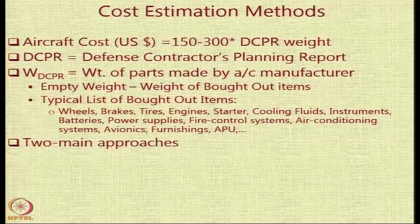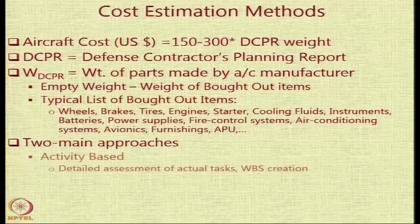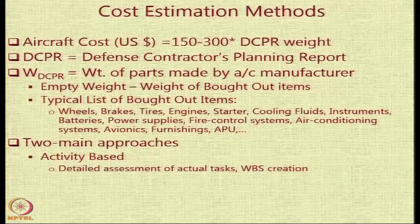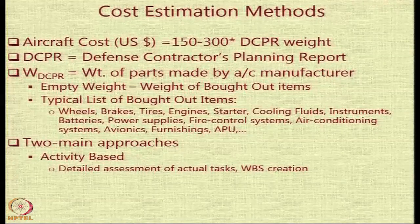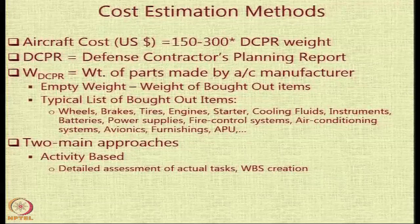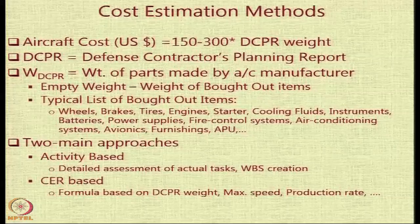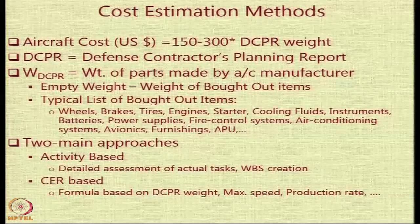We admit that this particular method is a very crude method. Then there are two other approaches. One is called the activity-based approach, in which the actual tasks to be carried out in the conceptual design are detailed, a work breakdown structure is created, and the cost of each element is added up. This is called activity-based costing.